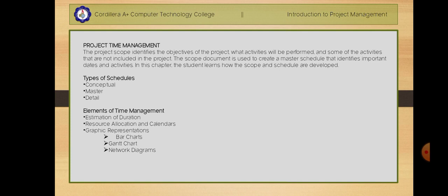For example, if the duration is 3 days and the start date of the activity is Thursday, the activity would begin on Thursday and end on Monday of the following week, assuming the resource calendar shows the person has the weekend off. If the weekend included an extra day off for a holiday like Labor Day, shown in the company calendar, the completion of the same 3-day activity would be pushed to Tuesday.